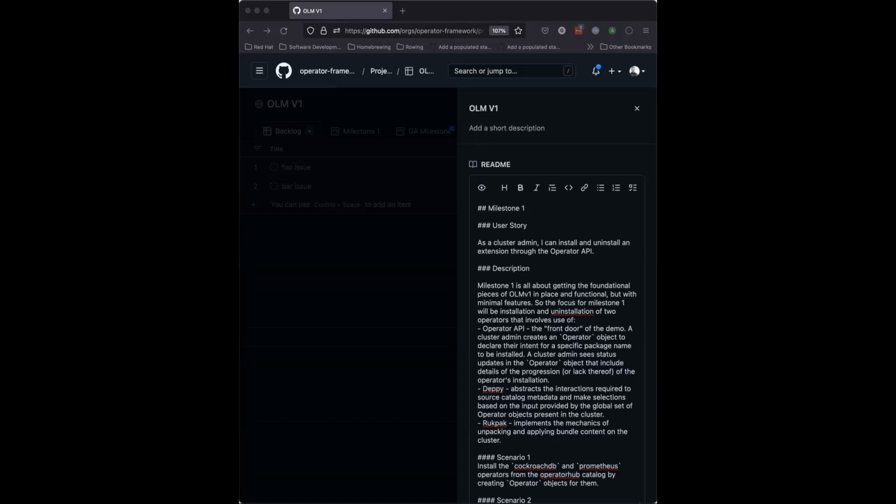We could just keep track of those as special issues on the project, and then as we're nearing the end of milestone 1, we can come together and say, okay, what's the next thing that would probably add more value? Maybe it's in that trove. Maybe we find something new that we didn't know, something entirely new, and then we can decide together what the next step is.